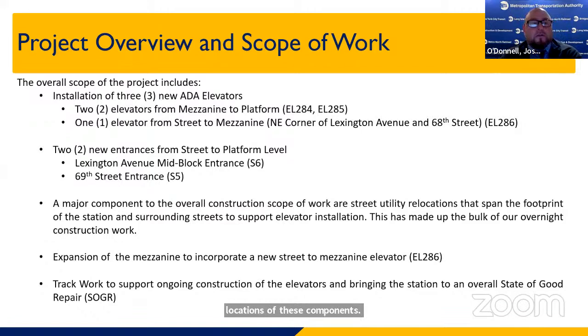A major component of the overall construction, as I mentioned, is the street utility relocations. They span the entire footprint of the station and the surrounding streets, and these utilities need to be relocated and upgraded in order to support the elevator installation. This makes up the bulk of the work that we're doing overnight. We are restricted to doing this work overnight because of the congested nature of this area of town and all of the traffic in the street on 68th, 69th, and Lex that requires us to do this work